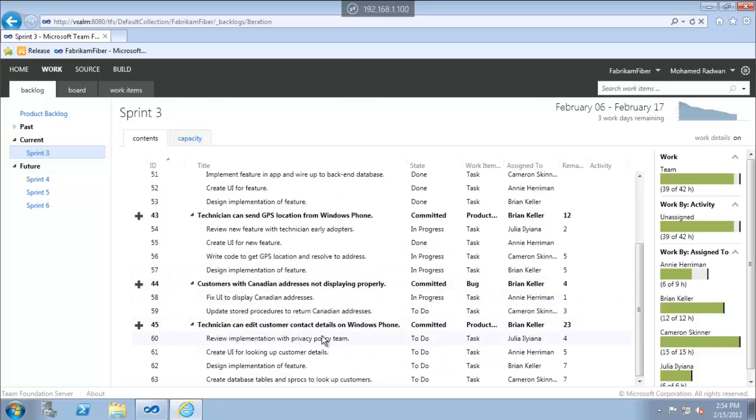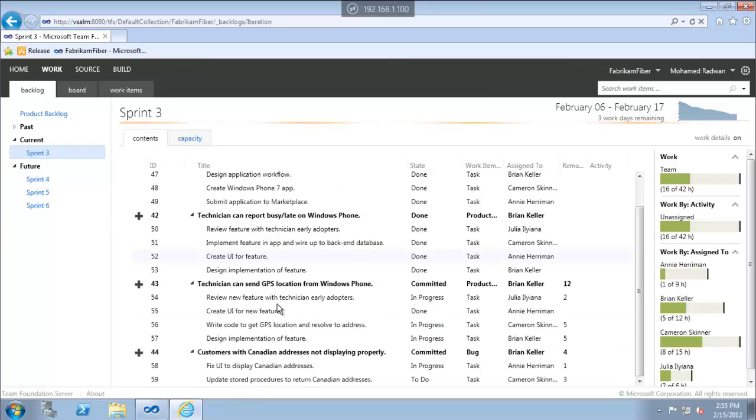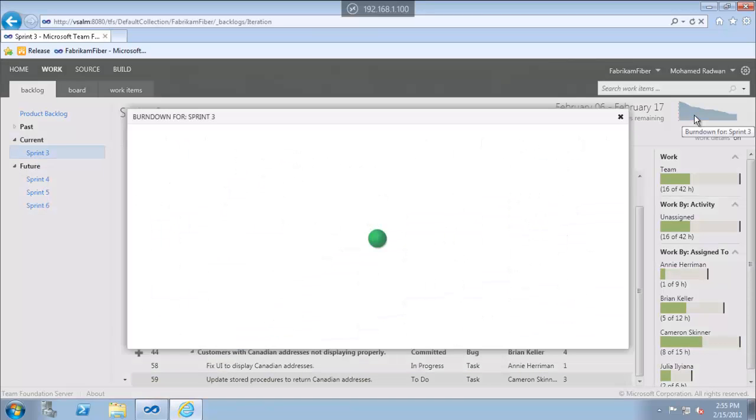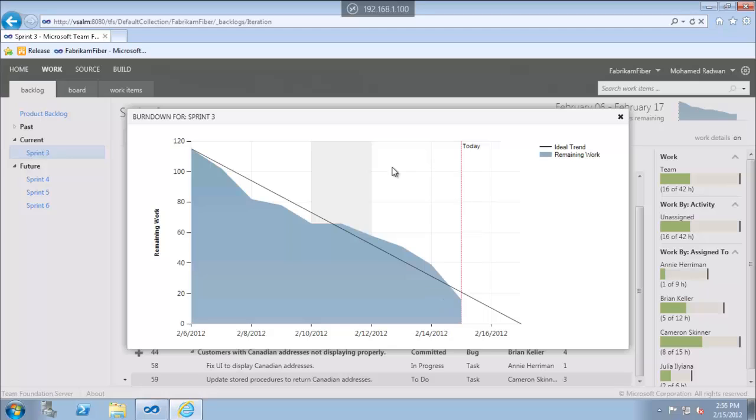If we go to see these PBIs for Prime Killer, it is not started yet, so maybe we can move this to the coming sprint, and this will be reflected if we open the backlog. Because we monitor the burn down so we can know how our sprint is going to work. So at some point we maybe need to drop some user stories.